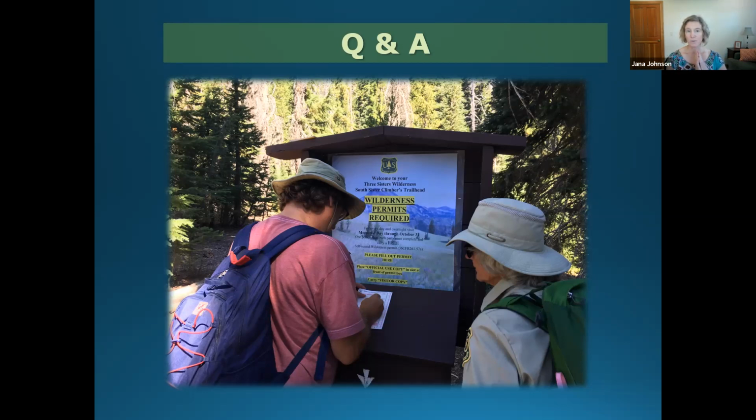Typically what I have seen with NEPA is that if you do your homework up front, the pre-NEPA, getting a sense of what are the knee jerks to this throughout the community? What is likely going to pop up that could be an issue? And if you go through that process and vet that out before you're actually in the NEPA process, and a lot of that is just conversations with the Forest Service, conversations with the specialists, finding out where there are sensitive areas and things up front.